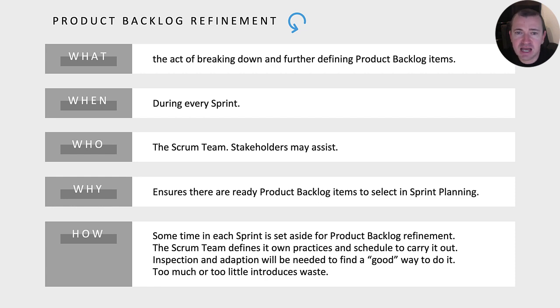If a Scrum team is unable to successfully refine a product backlog item due to insufficient knowledge, some work may be required to learn more about this product backlog item. Work around this would often be called a spike. A spike is a good practice learning activity designed to deepen our understanding of a product backlog item before development begins. A spike may be added to the product backlog as a product backlog item and work completed against it to increase the Scrum team's understanding of work before the full development activity occurs in later sprints.